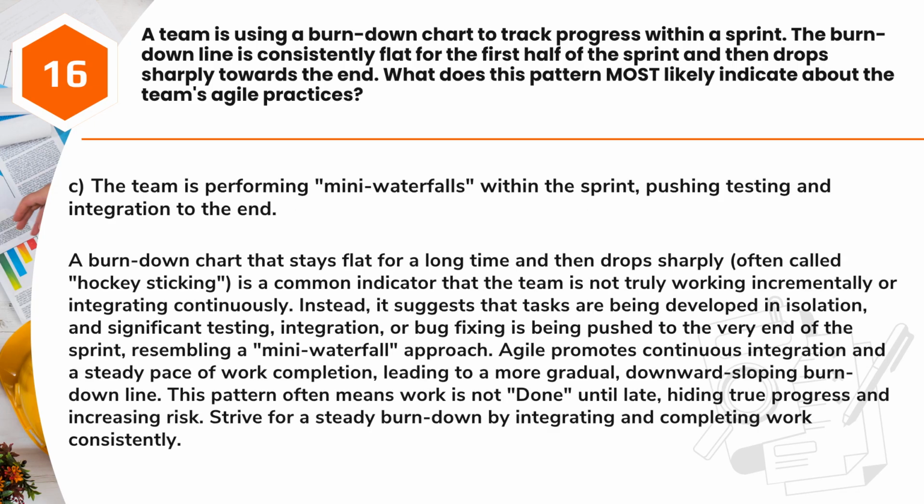Answer: C. The team is performing mini waterfalls within the sprint, pushing testing and integration to the end. A burn-down chart that stays flat for a long time and then drops sharply, often called hockey sticking, is a common indicator that the team is not truly working incrementally or integrating continuously. Instead, it suggests that tasks are being developed in isolation, and significant testing, integration, or bug fixing is being pushed to the very end of the sprint, resembling a mini waterfall approach.